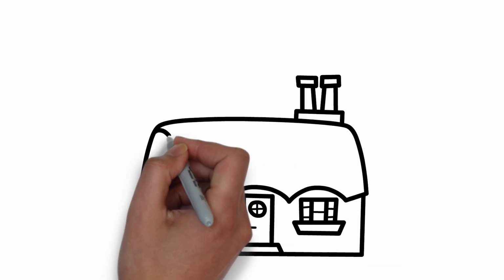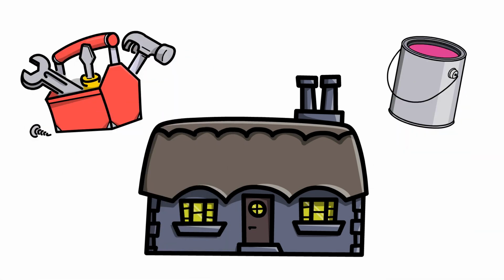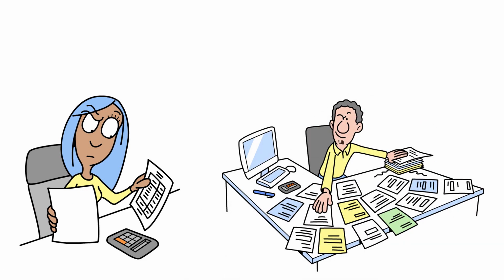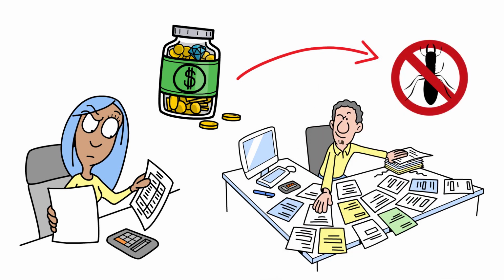They began by assessing the property's needs, from cosmetic updates to essential structural repairs. By prioritizing tasks and allocating funds appropriately, they stayed on target. Their contingency fund covered unexpected termite damage, proving its worth tenfold.